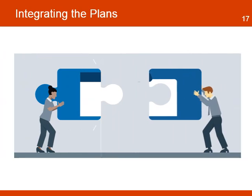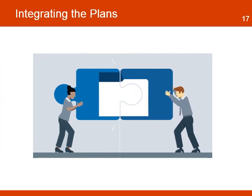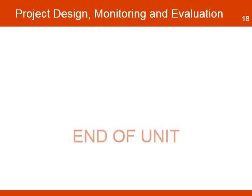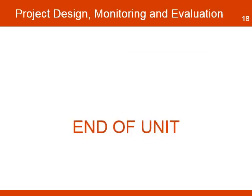Once a team completes the development of the managing plans, they need to be integrated with the monitoring and evaluation plan in order to ensure that the activities of both plans are done in a coordinated fashion. Failure to do so might result in plans that are being implemented at different times and provide information that will be difficult to reconcile. It is a responsibility of the project manager to make sure that the integration of all project plans happens before the implementation phase.